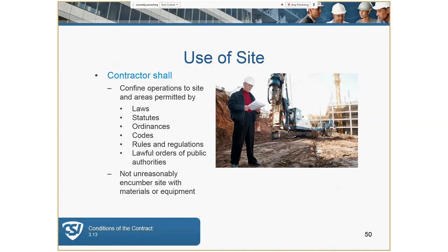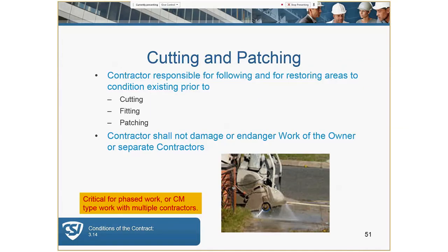Use of the site: the contractor should follow all laws, statutes, ordinances, and codes, and should not unnecessarily encumber the site with materials or equipment. Cutting and patching: if you cut it, you fix it. The contractor is responsible for cutting, fitting, and patching and restoring the area to the condition existing prior to. This is critical especially in phased work or construction management with multiple contractors.